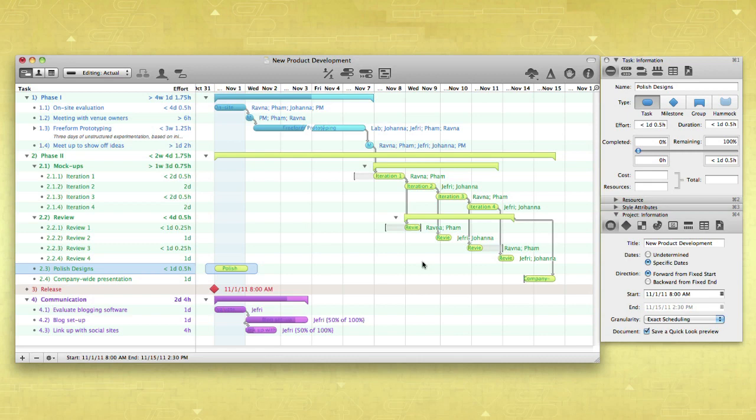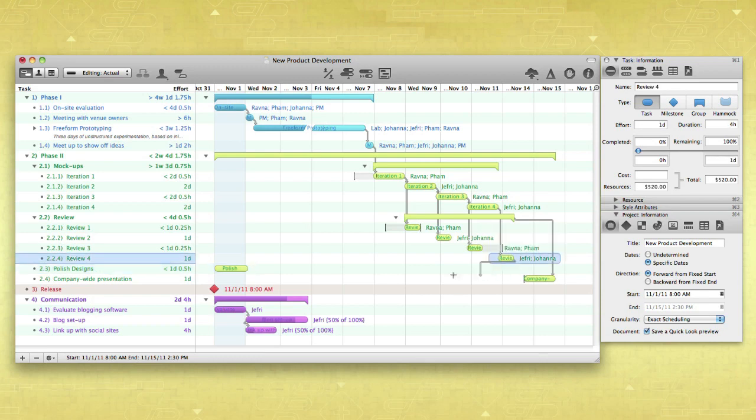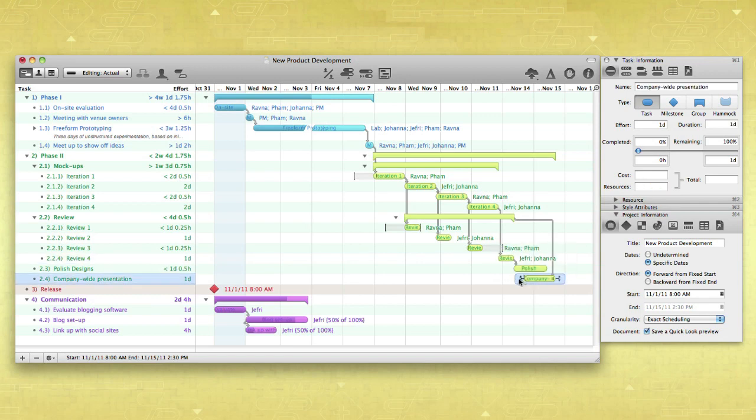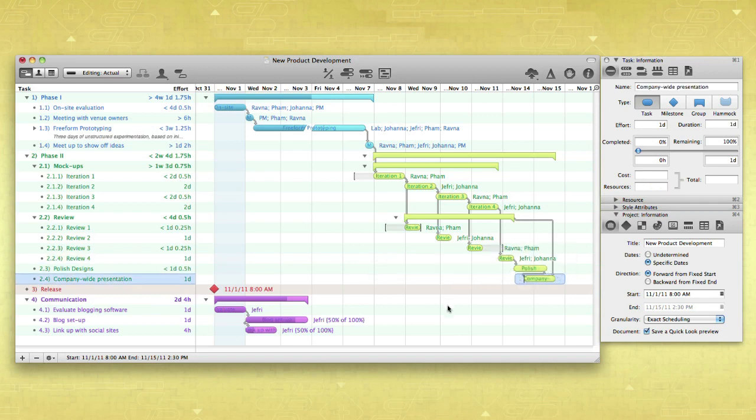For example, the time allotted for polishing up a design is dependent upon when it's completed and when it's due. To create a Hammock Task, simply create a Finish to Start dependency with the preceding task and a Start to Finish dependency with the following task.